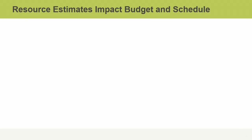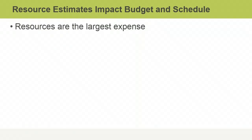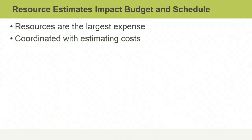Estimating activity resources is important because resources — whether people, materials, or both — are typically the largest expense you'll have on any project. Estimating the resources for project activities is usually coordinated with estimating costs for the budget. Knowing what resources are required enables you to get a more precise estimate of what the project will cost so you can develop a realistic budget.